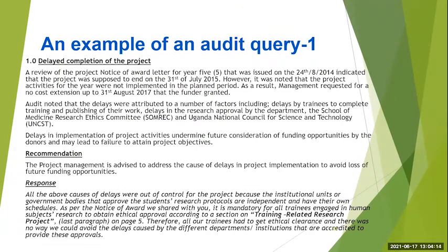I don't know whether my screen can project this in a bigger format, but I can still go ahead and read. Delays in implementation of project activities undermine future consideration of funding opportunities by the donors and may lead to failure to attain project objectives. The recommendation here was that the project management is advised to address the cause of the delays in project implementation to avoid loss of future funding opportunities.